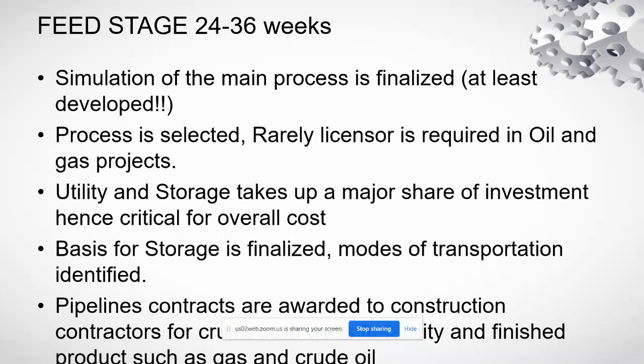Then modes of transportation are identified. Facilities which are very big in nature most of the time don't depend on road transportation for their products. They depend on pipelines. So pipeline for oil and pipeline for gases are the modes which are identified. Pipeline engineering involves a basic engineering effort much less than a hardcore facility, so these basic engineering phases for pipeline projects move very quickly.